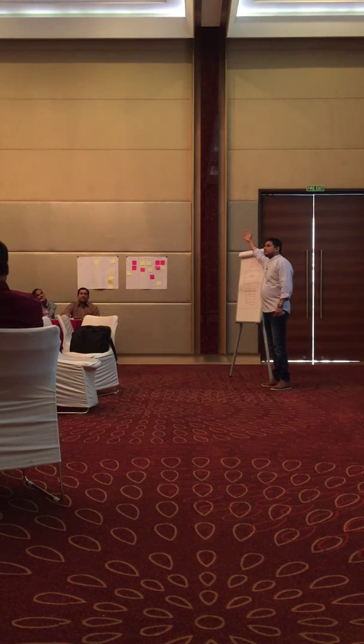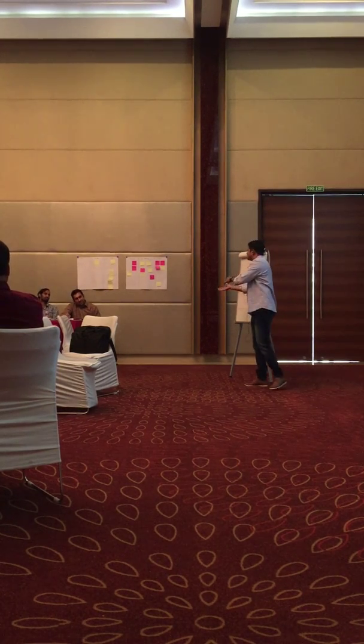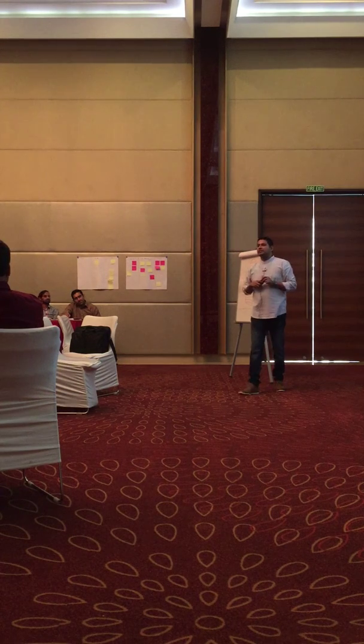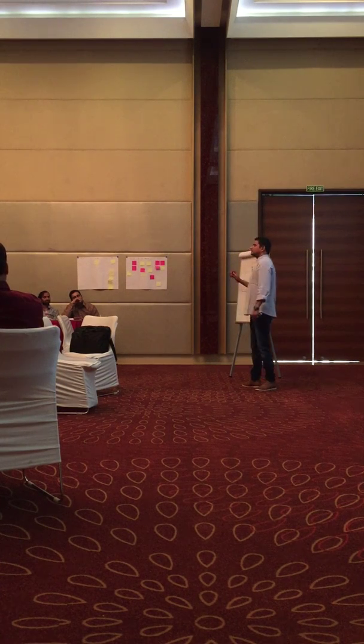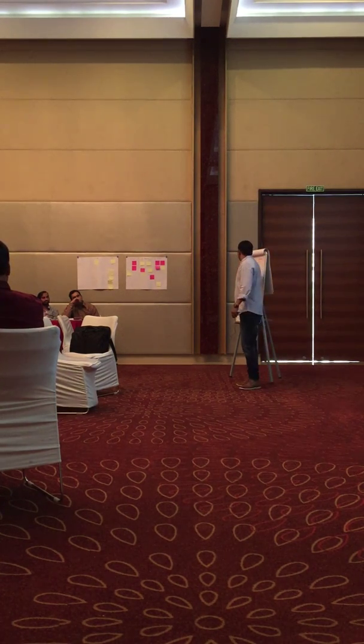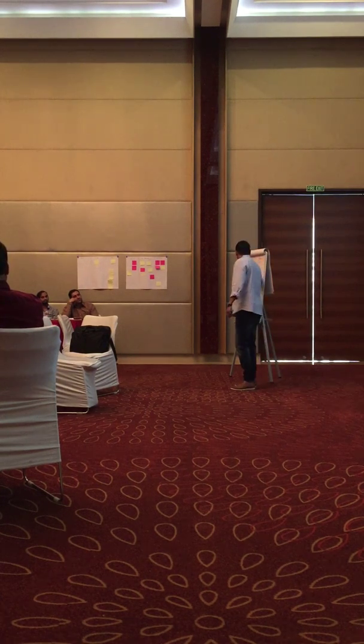Where is the value delivered? Only once you complete all of these, the integrated user interface, business logic and the database. So what is the best way to split? Five fields. Out of these 45, tell me which 3 or 4 fields are very, very important for the delivery. Because registration is dependent on login, the customer or product owner can say login, first name, last name, password, these are the 4 things. So out of this epic, registration, I may write, as an unregistered user, I want to register using first name, last name, these things, so that I can become a registered user. First sprint gone, your login and all can go.